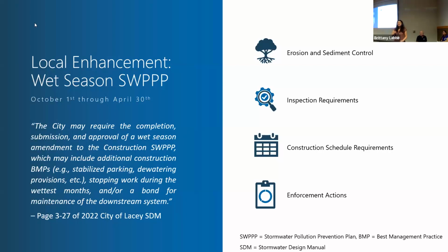I'd like to talk in a little more detail about the differences between a typical construction SWPPP and this wet season SWPPP, and those things are outlined on the screen above. I'll start with erosion and sediment control. There may be additional construction BMPs that are required during the wet season. These include dewatering provisions, as well as stabilized parking or other BMPs. In addition, stop work might also have to occur during the wettest months of the year, and a maintenance bond for the downstream system may be required.